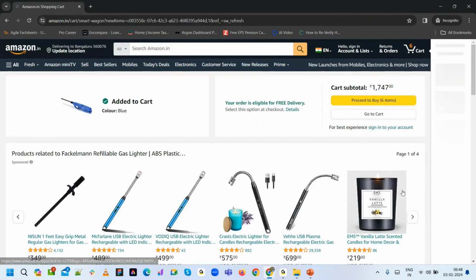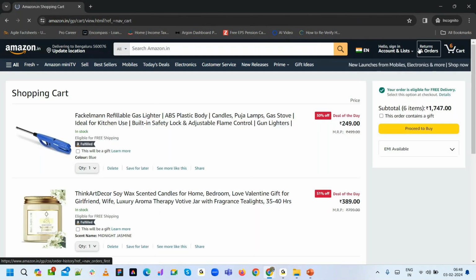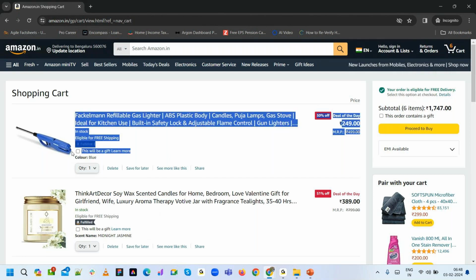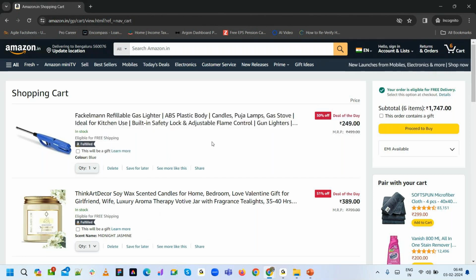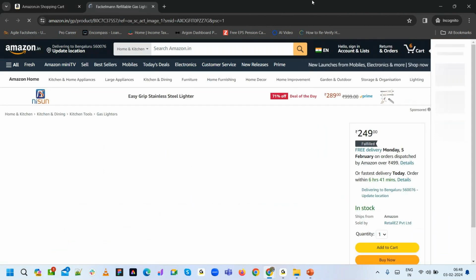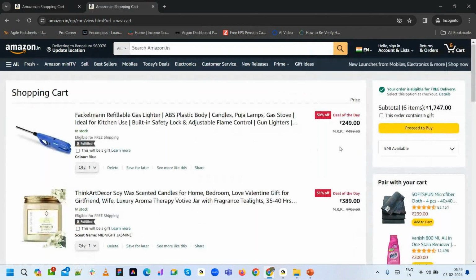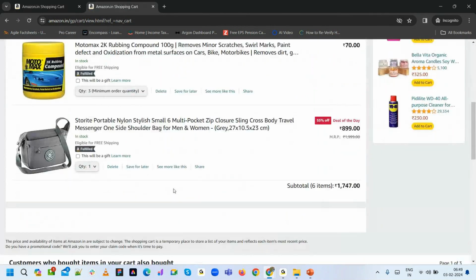So now you have a lot of items. What all stories do you have? Increasing or decreasing the quantity is one of the stories. Gift wrapping is one of the stories. Delivery is under checkout, a different epic altogether, correct? Just within the shopping cart, gift wrap is a facility which I can build, correct? Adding or decreasing a coupon is one of the stories. Coupons are applicable within the cart, right? So that is one of the stories. Delete is one of the stories.